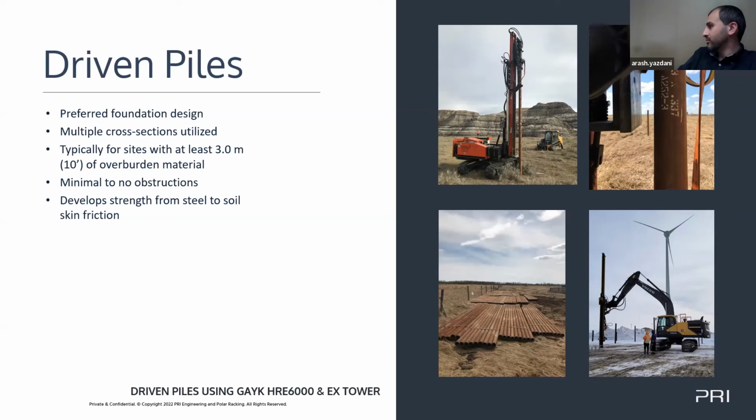Because you have different lengths, different styles, getting those manufactured. You don't just go to Home Depot and pick them up. I want the 3.5 inch screw versus the 4-inch screw. You don't have that, especially with challenging supply chains like we have now that just amplify, compound, pick whatever word you want, and make it a nightmare if you don't get it right early on. You have to be as smart as you possibly can be going into it. Then you can deal with the smaller challenges that inevitably arrive, but at least those don't cripple the schedule and then potentially cripple the project.